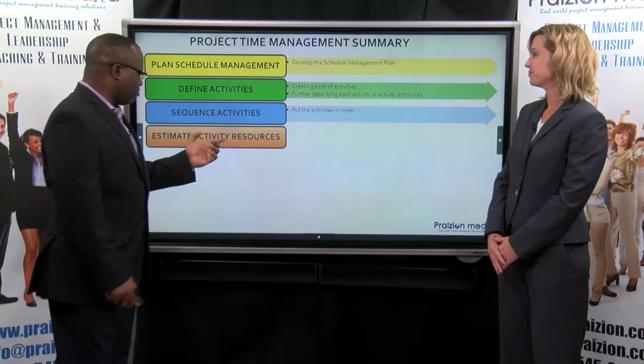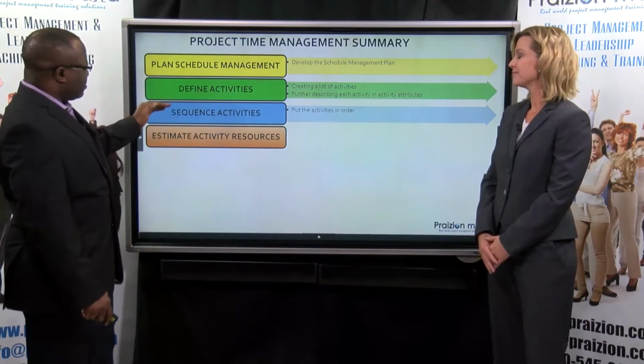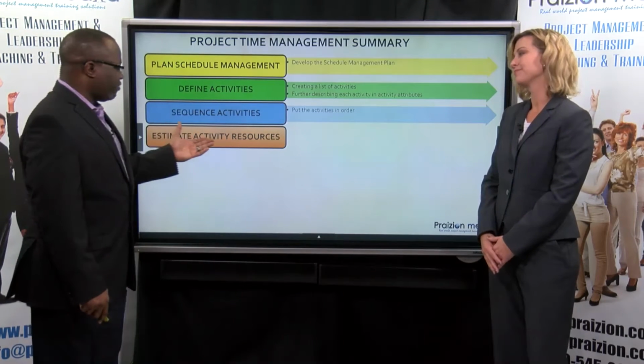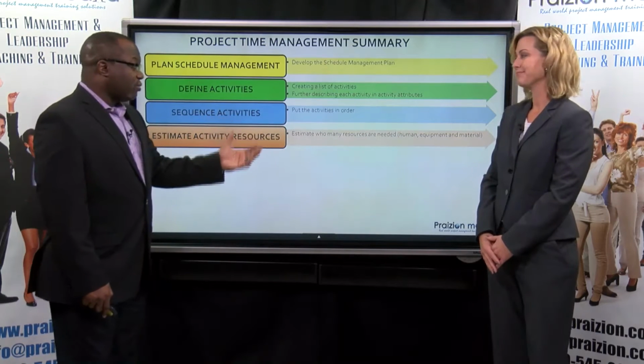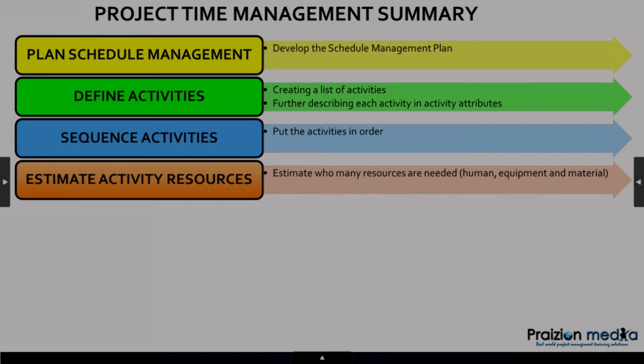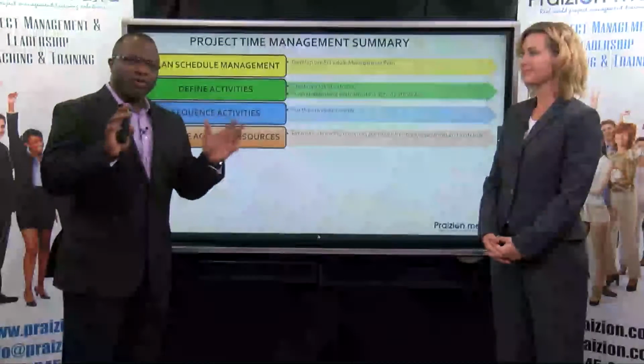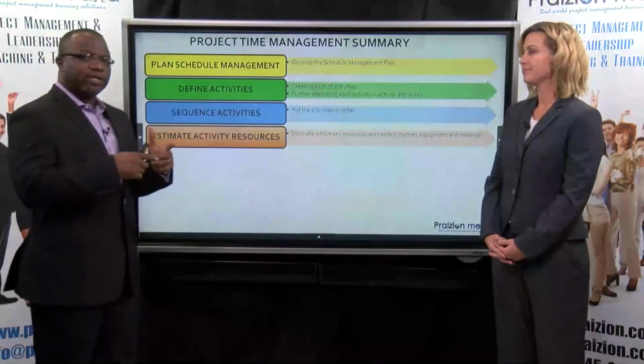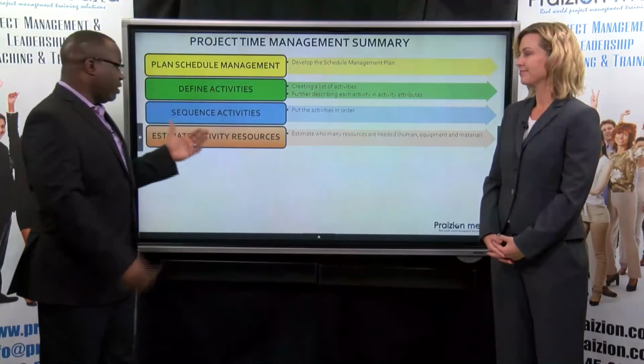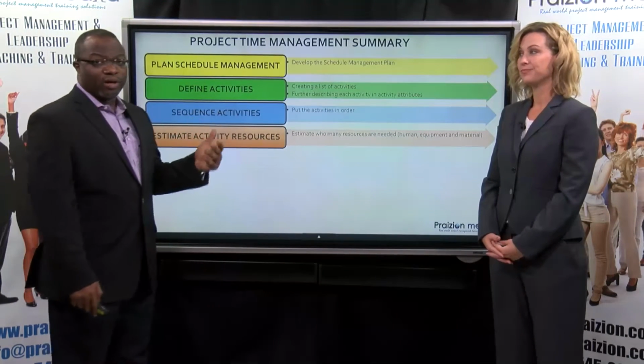But if you're really thinking properly, you ask yourself, okay, I've sequenced them in a particular way. Now, who do I have available? And also, you think about the effort. Because when you think about the resources, think about the effort they're going to be expending. This is a little bit different from saying, oh, my project's going to take 10 weeks. That's not what you're doing here. You're thinking about effort, hours, and ultimately the people working on the project and how they work could determine what happens next.